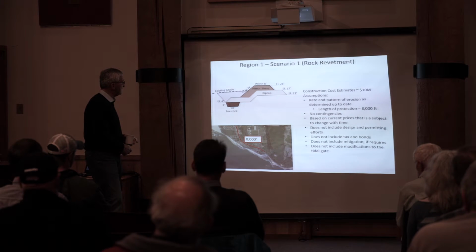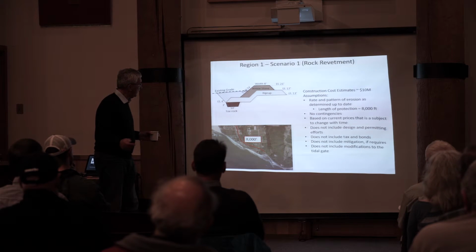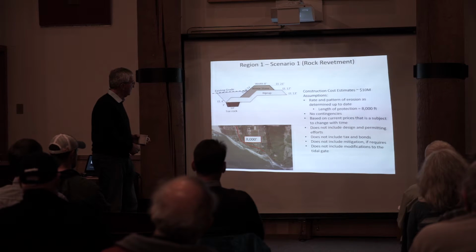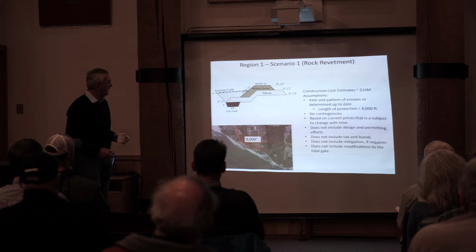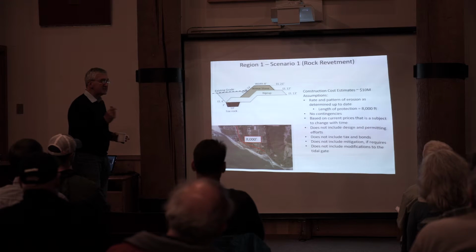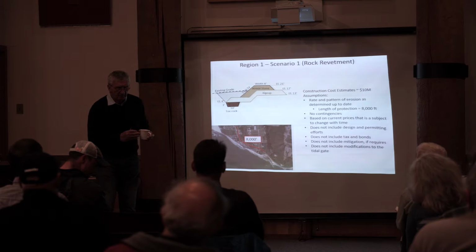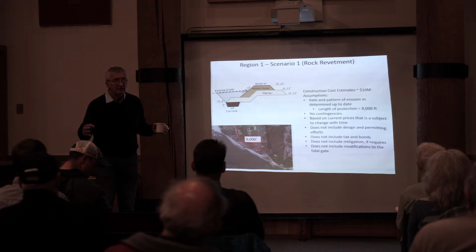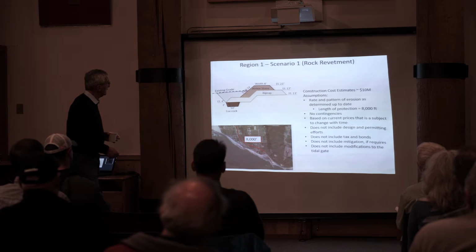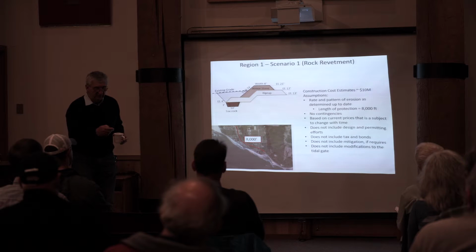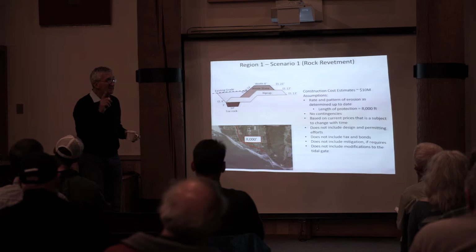Or we didn't put in contingencies. Based on the current prices, we do not include any permitting and engineering effort. We do not include mitigation if mitigation is required, and so on and so on. But again, this is a construction cost estimate only, and I would say this is not even preliminary. It's a magnitude of estimate. Therefore, you see we don't have decimals and anything. This is scenario 1, if we decided to do only the highway, you remember criteria number 1.